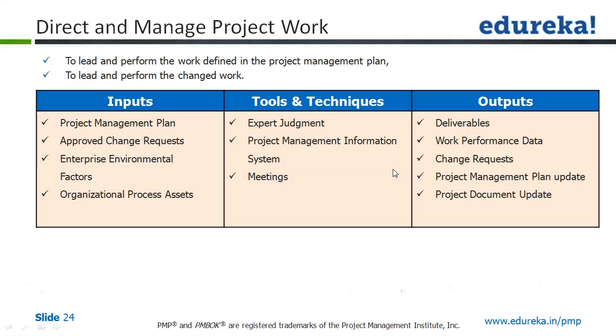This is called a WBS, and the moment a word dictionary is attached to it, which is the WBS dictionary, it means that each of those activities is documented with its attributes, its features, and a description and detailing of those WBS activities.